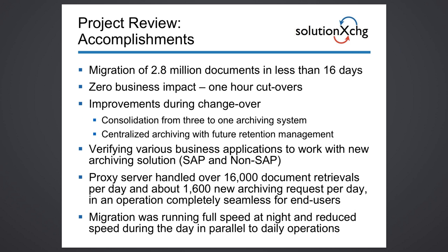But overall, migration of 2.8 million documents in less than 16 days, zero business impact with 1 hour cutovers, improvements during the changeover. We consolidated from 3 to 1 archiving system. We centralized archiving for future retention management. Should be much easier now because everything is in one spot.